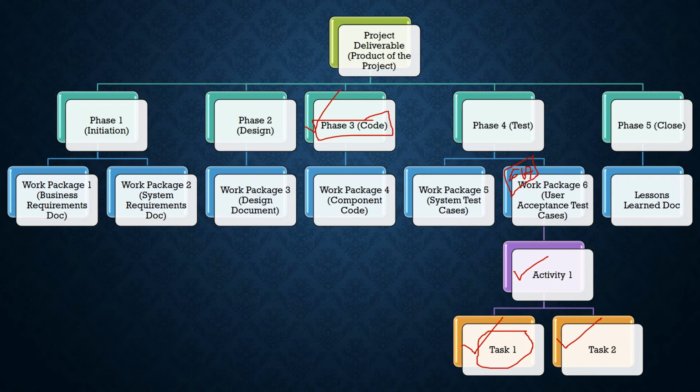Are you lagging behind or are you ahead? So this is why control accounts are very special. This is why control account is an important concept, and this is why you should know about control accounts. Again, control account could also include more than one work package. Let's say your project team decides that phase 1 initiation is going to be a control account because this is a good enough measure to understand where you stand in the project. Then this is going to be the control account, and this is where you are going to measure the progress of your project from.